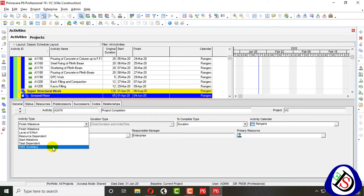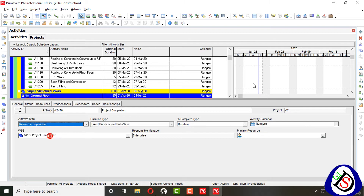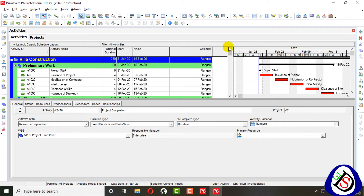I will now discuss Level of Effort, Resource Dependent, and WBS Summary. Task Dependent activities are dependent on predecessors and successors, and duration is applied directly. The Start Milestone has only a start date, and the Finish Milestone has only a finish date. Now I will move on to Resource Dependent.